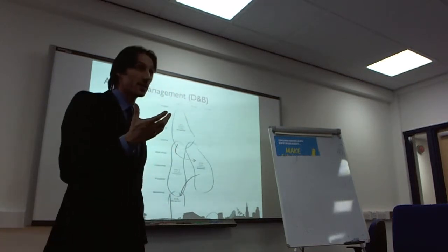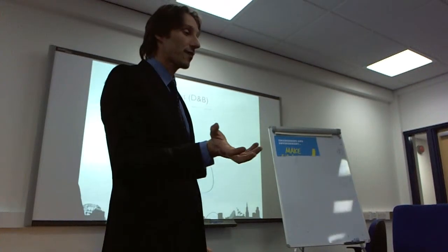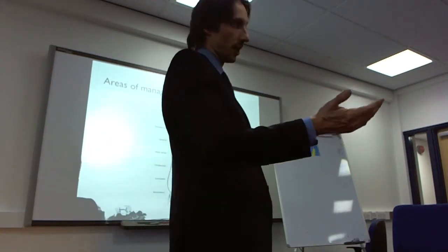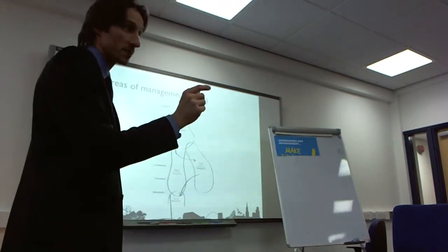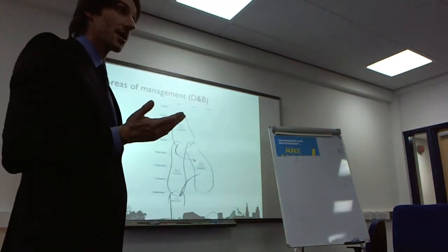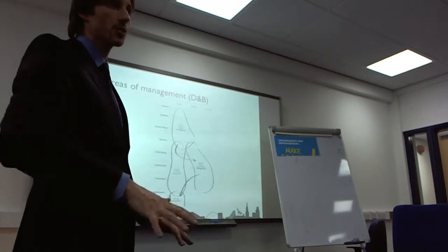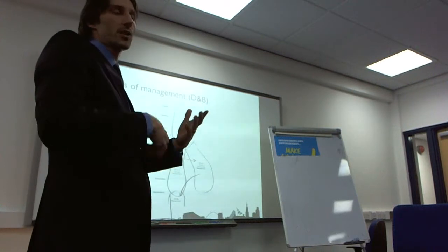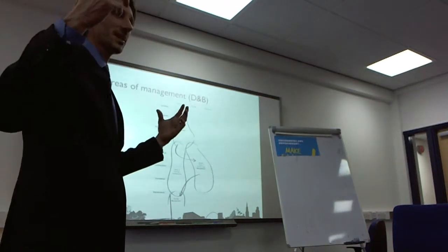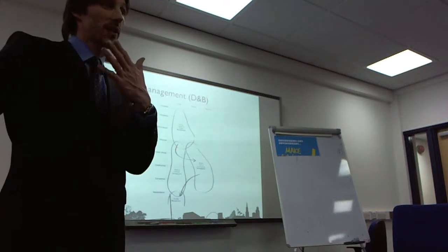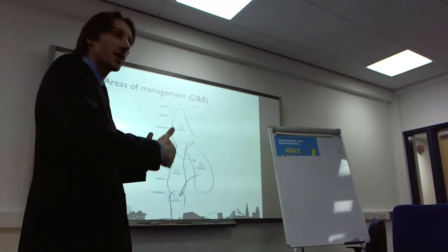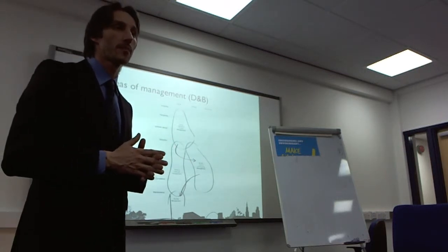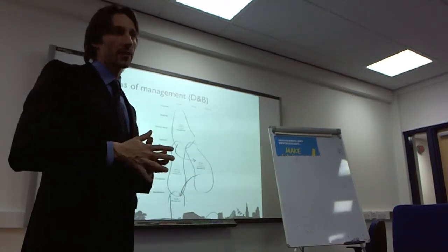Another potential benefit is that if the design does not need to be fully completed before you appoint a contractor, you save some time, and the contractor can start building the foundations and some portions of the work before they have the full design, because they know that maybe the doors have not been selected completely yet, but they will have time to do that as they start working. So the time frame is shorter. Yes? You mitigate risk as well. But that is more so. Well, I haven't covered that yet, but yes, absolutely.